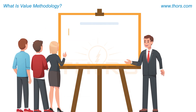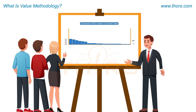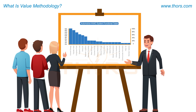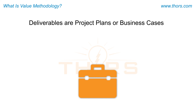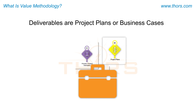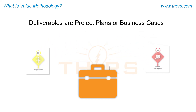The Value Study team analyzes the functions, identifies the cost drivers, and draws up alternate solutions to produce a competitive project. The deliverables of a Value Study are project plans or business cases containing the findings and proposals of the Value Study team.